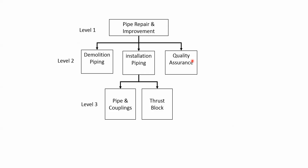Unlike some scheduling software programs that are somewhat of a bottom-up approach, Primavera P6 Professional encourages you to create a WBS or deliverable breakdown structure at the beginning of the project. This is known as a top-down approach.